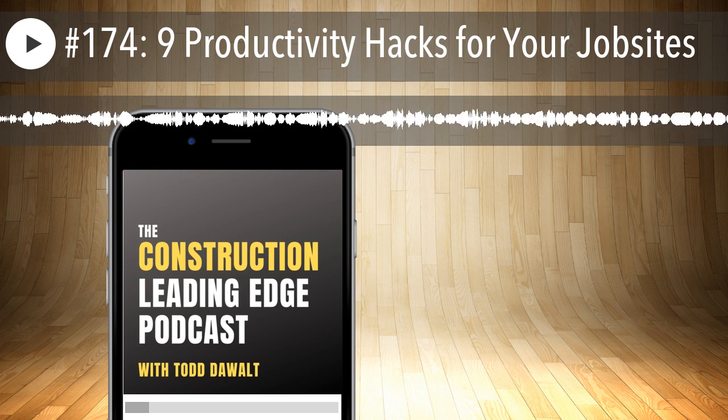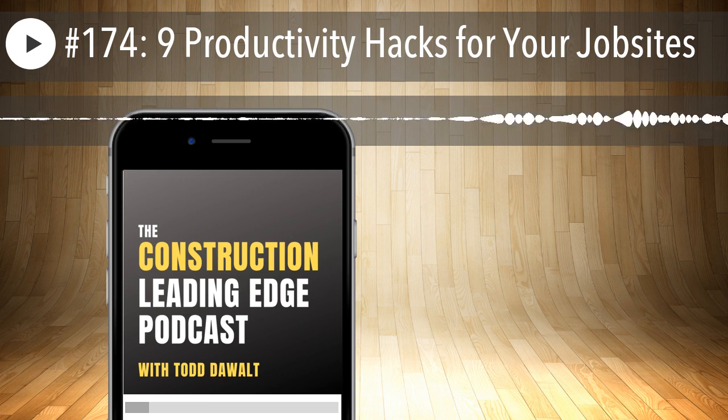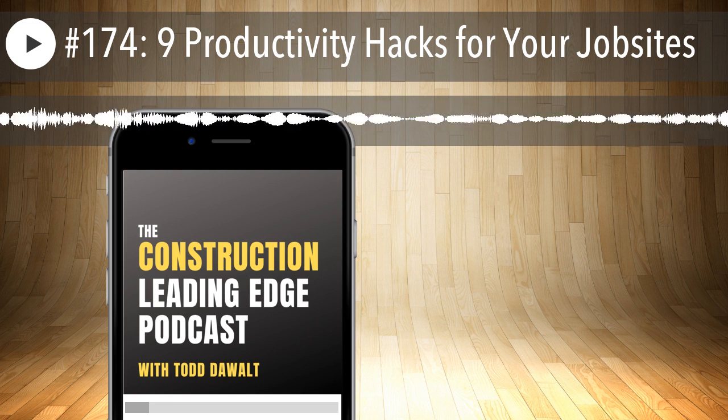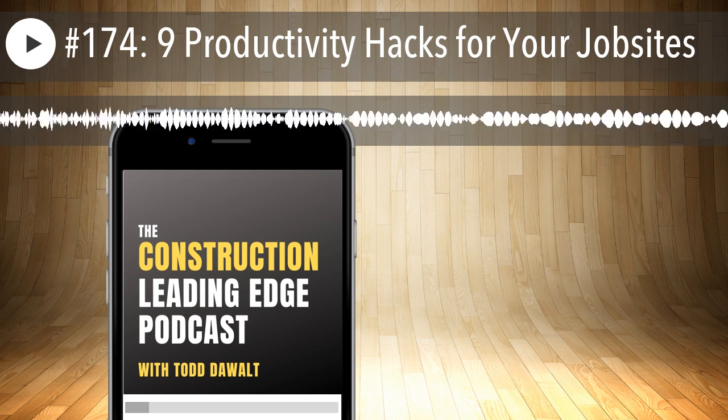Block out time and say, hey, we're going to talk, Mr. and Mrs. Customer. I'm going to send you an update once a week. And that's where all of your questions are going to be answered. So don't call me. Or if they do call you or they do text you, you tell them, check your weekly update. Use CoConstruct. You can send reports that way.